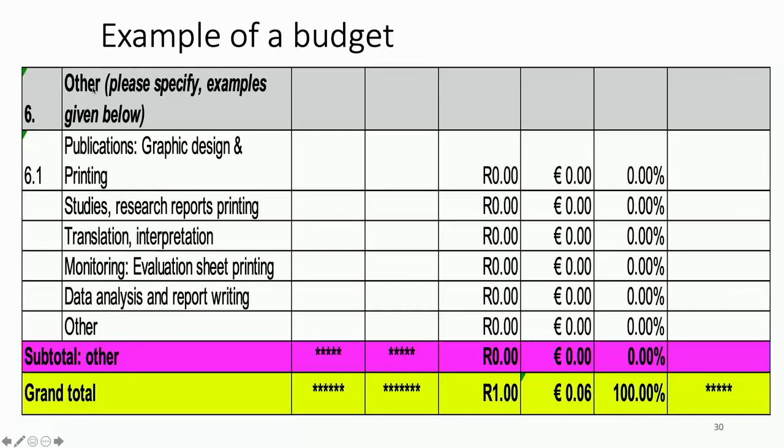Where's the cost for monitoring these workshops? The cost overall for monitoring the indicators and obtaining the sources of verification and the data to do the monitoring and evaluation. Data analysis and report writing as part of that. That brings you to the grand total of your application. The spreadsheet will add up and you'll get an indication whether you're over budget or under budget in total on that.